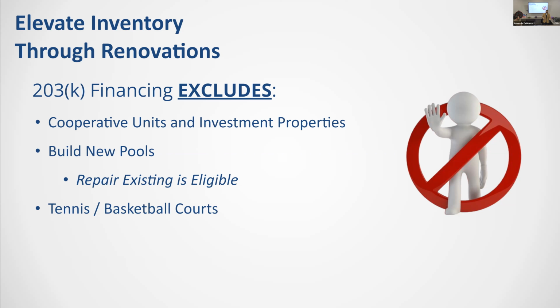He could just pump these out left and right because not a lot of people have that. And some of the smaller contractors, like you said, they're taking this money because they're late on another job. They're paying that with your money. That won't happen. Now, what we can do, and it is permitted, is you can get 50% of the material cost for very specific items like cabinets, but they won't pay the homeowner or the contractor. They'll send it directly to Home Depot.